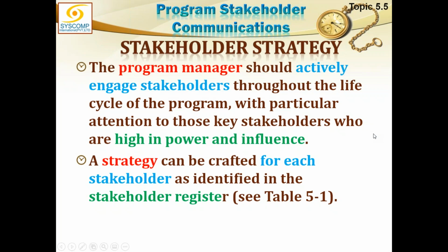Program manager should actively engage stakeholders throughout the life cycle of the program, with particular attention to those key stakeholders who are high in power and influence. A strategy can be crafted for each stakeholder as identified in the stakeholder register.